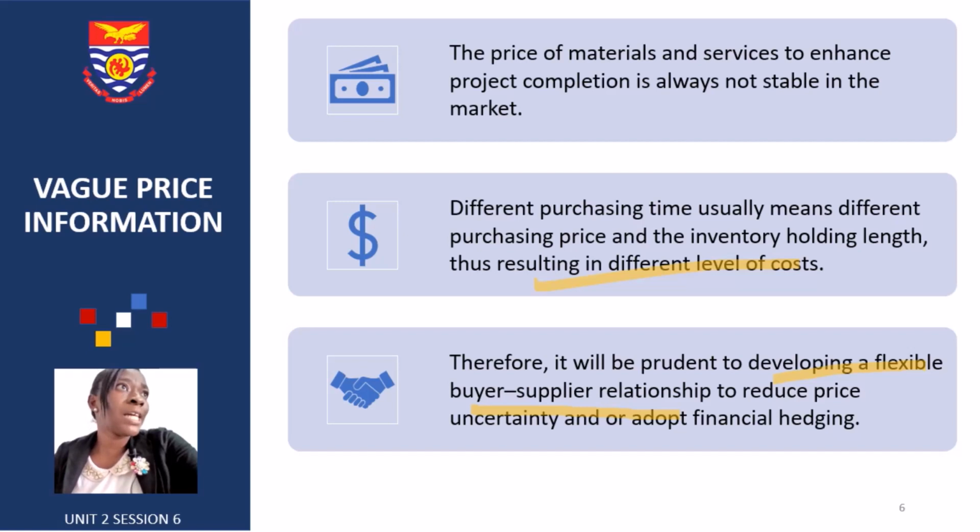Maybe you're into production, or your project is doing production of a product into the market, which is going to be using a lot of oil or something. And we know the price can just go up to 1,000 plus per 25 liters, and it can just go down a little bit, 900 and something. You can then speak to your supplier that, well, I'm going to be using a lot of oil, and so I'm going to buy, let's say, 10 gallons over this 1 week, and so I'm going to buy it from you at 950 cedis. You've hedged it, whether it is increasing more than that or it is going below that. At least you know that you have planned with that and you're going to work with that.